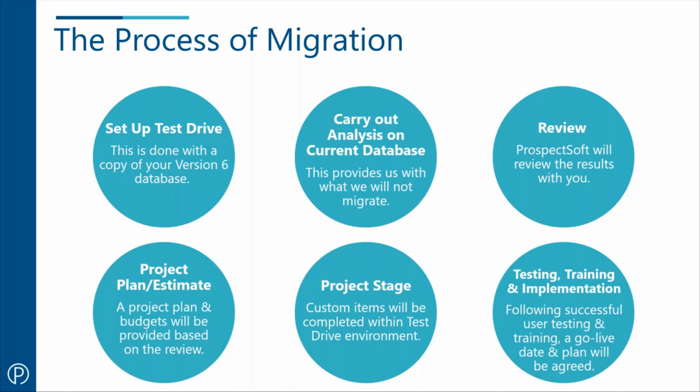It is a change for your sales team, it is a different system for your sales and customer service teams and so on. So we do recommend the training, which we'll talk to you about during the project stage. But we typically would do that no more than probably a week or two prior to the go live, just to make sure everyone remembers that training when they're ready to log into the system and start running with it. So that's our typical overview of the process for migration.